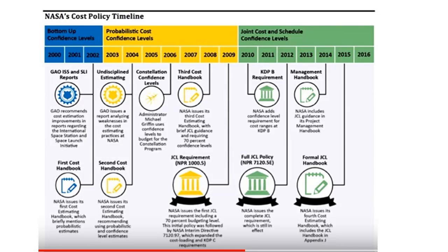You get to the integrated cost schedule risk analysis that Dr. David Hulett, he's my mentor. I learned my trade from Dr. Hulett. He was the big driver around integrated cost schedule risk analysis, wrote books on it. The AACE's recommended practice 57R documents not just the JCL, but the entire integrated cost schedule risk analysis methodology. I know my learned colleague who's also on the call here can maybe agree or disagree with me. I'd love to hear your comments on it.